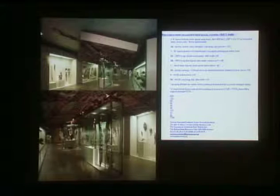After completing that somewhat daunting task, all our data was entered into the department's database. Lists sorted for us by size categories were generated. On the right, you see just a summary of these files put together by Victoria Southwell, who ran all these lists with photographs and divvied them up in various different ways so we could really get a handle on what it was we had to store, because we had to estimate exactly what kind of storage space we were going to build here, how big, how long, how many shelves, et cetera, et cetera.